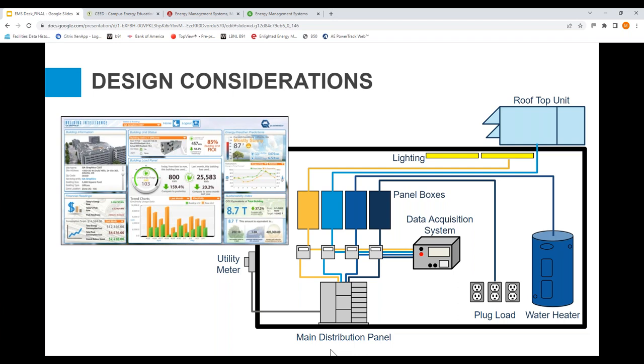Also, of course, what metrics you want to measure. Defining those early is probably essential, because that's one that you absolutely have to do. You need to understand what you're going to measure so that you can make sure you have the infrastructure, the sensors, the hardware, the IT, the network, the security, like everything. There's a lot that goes into it, so define that early.